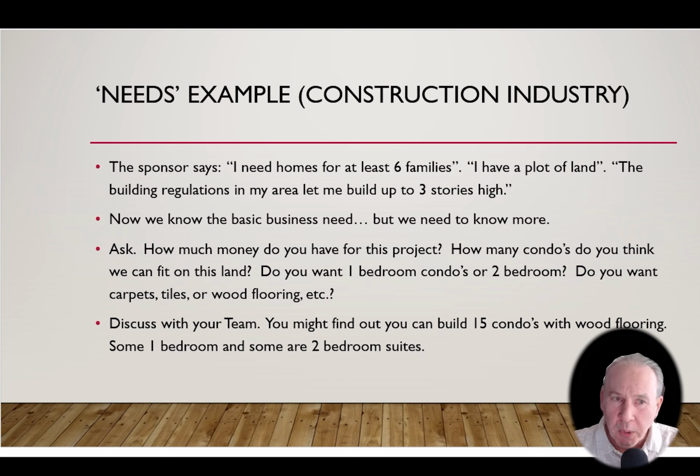Now at this point, the project manager would ask questions. Well, how much money do you have to spend on this project? How many condos do you think we can fit on that piece of land you've got? Do you want 1-bedroom or 2-bedroom condos? Do you want carpets or tiles or wood flooring? What size of height of the ceilings, and so on and so on. So that's the needs, and figuring that out.